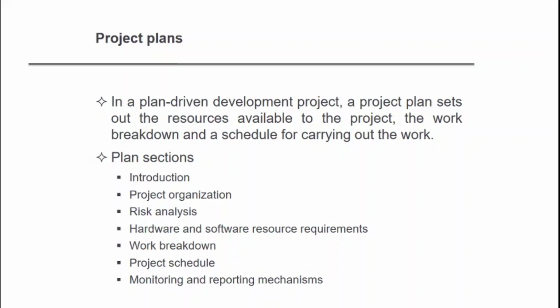Work breakdown. This is the breakdown of the project into various activities, and identifying the milestones as well as deliverables associated with each activity. A milestone is something like, you have module 1, module 2, a number of modules for the particular software development, and at what time module 1 has been completed, at what time module 2 is completed, whether module 1 is independent of module 2, and so on.